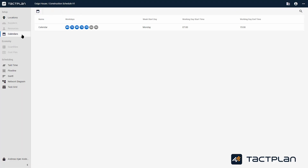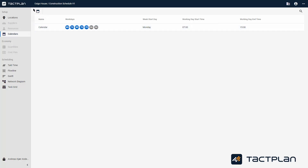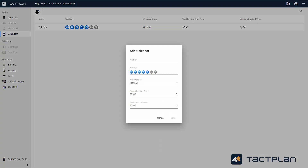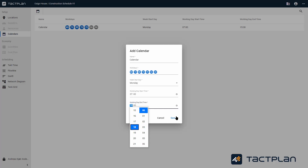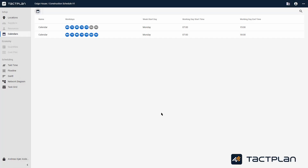To your left, you can click on Calendars. Here you set up your work calendar — it determines which day you start the week and how many hours a work day has. It is possible to add several calendars if your workers have different working hours. You type in the name, choose the days, set when it starts and ends, and simply click Save. You can also delete a calendar.